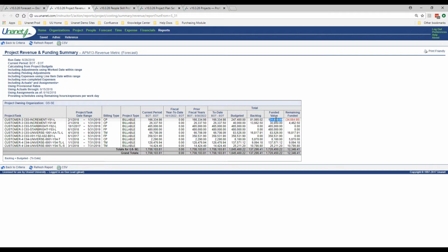So without having to get into the gory details of how to do finances and how to manage that, you can show project leads: go do your job to manage the resources, get them in, plan them nicely, and make sure that you don't ever create more assignments than what we have money for. They run one report, and they're able to look at one column and see very easily that they need to do something. Now, how to change it, that's actually a different webinar that talks about how to do our rebalancing and how to adjust our resources. I'm happy to share that with anybody.